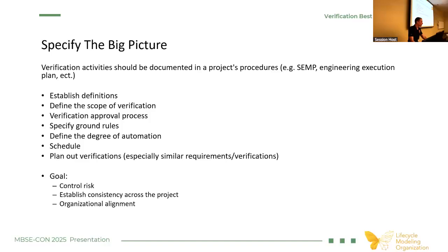So having that consolidated understanding across the board of what those verification activities are going to look like and how it's going to be presented is something that needs to be discussed earlier on in the process. Because by the time you're actually running testing and performing those activities later on, in some cases the contracts are signed, the money's been spent. So having that delineation of responsibilities can help streamline that process and make it a little bit easier for everyone to understand it.